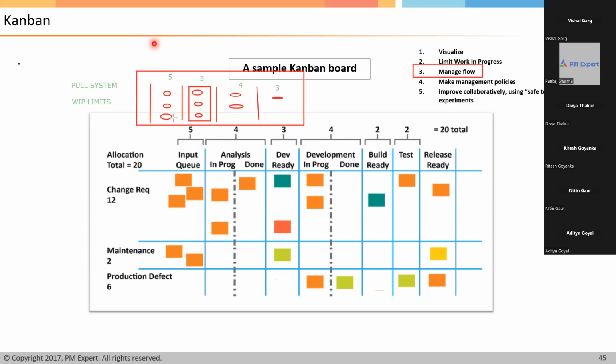It is clear right now because we have only one column full at limit. But what if we have five items in the first column? Then it would be difficult for us to find out from this picture. But if all these 5 items are done, that's what I'm saying. We need to make sure that we are showing the done column properly. Wherever we see that, we should show some holding area also, like in progress and done, so that we can find out the bottleneck process. In the same image, the one which is already there on the sheet, the test column doesn't have done, right?